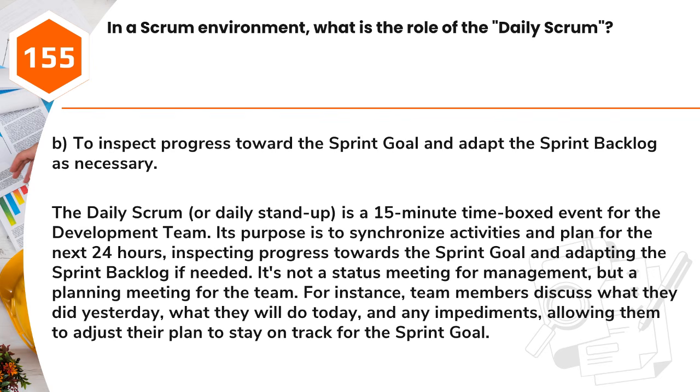For instance, team members discuss what they did yesterday, what they will do today, and any impediments, allowing them to adjust their plan to stay on track for the sprint goal.